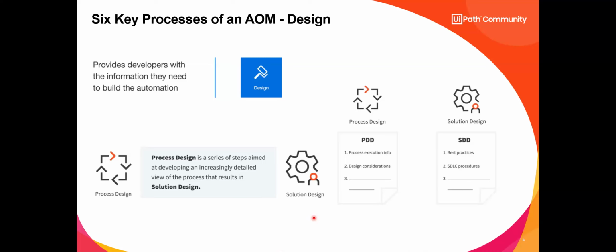I'm trying to be politically correct without letting out our company secrets. I needed a solution architect to really take these process design documents and break them down into more detailed solution design documents to give those developers a faster build time, a faster sprint of building, so we can build more than what we originally thought we would be building. So design is very important.